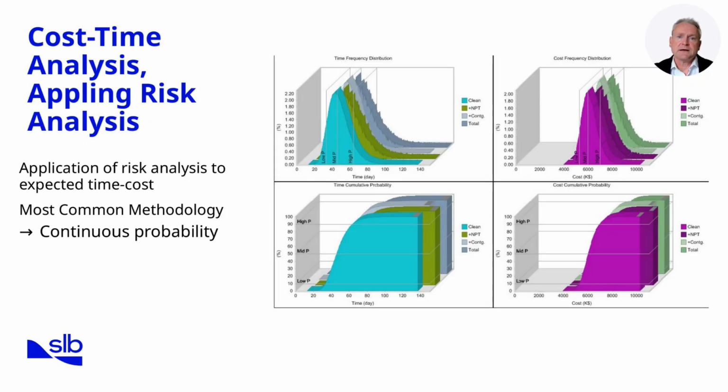One of the most practical applications of risk analysis in drilling is cost-time analysis. Every drilling project is driven by two key variables, time and money, and risk analysis helps us predict their range rather than just a single estimate. The most common methodology is continuous probability.